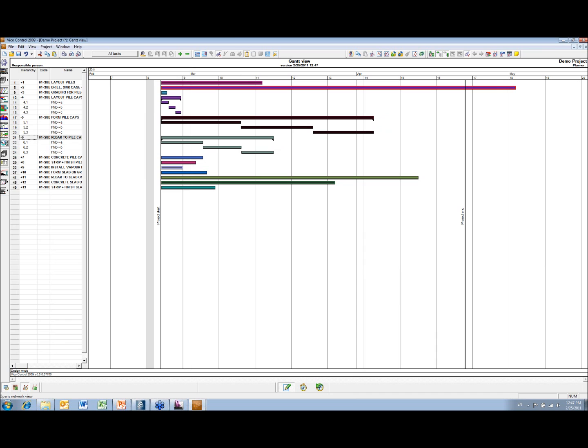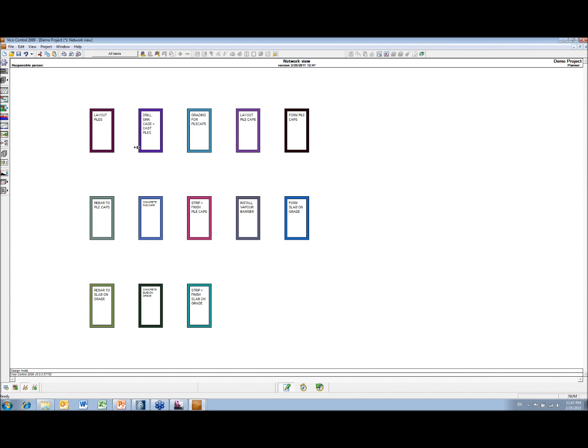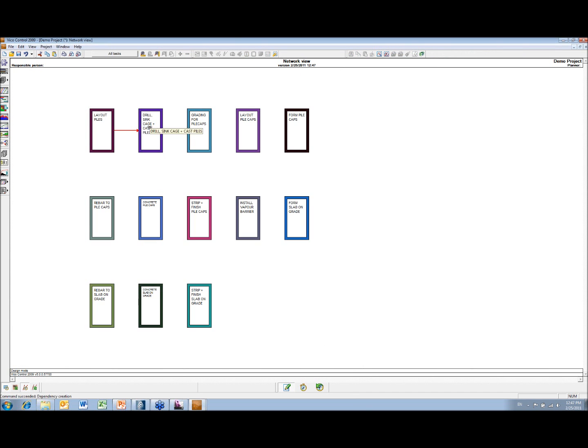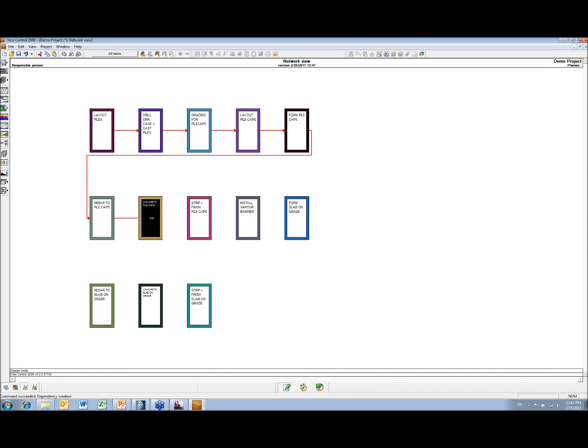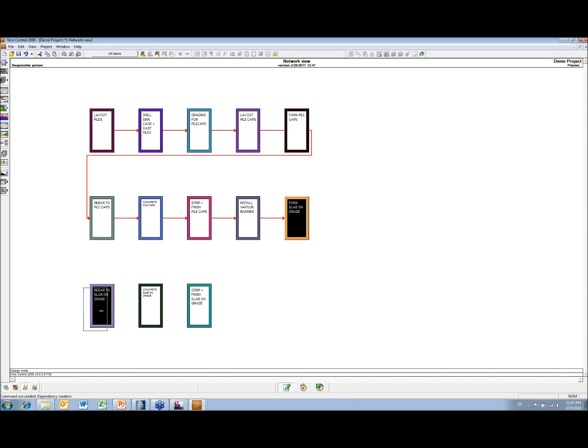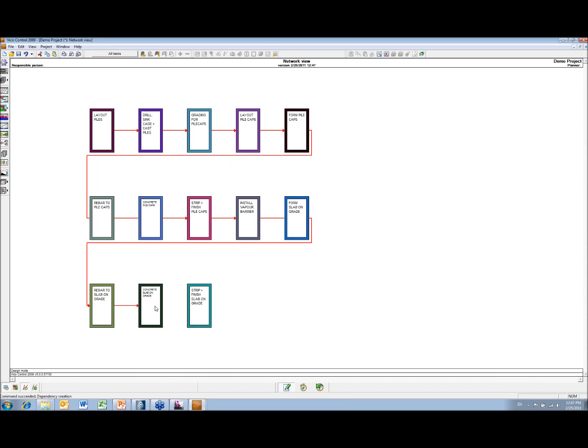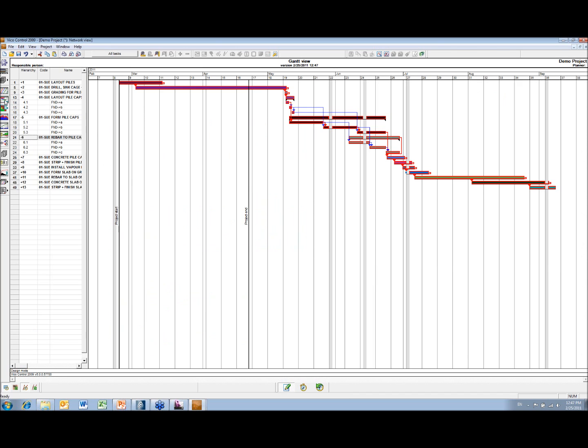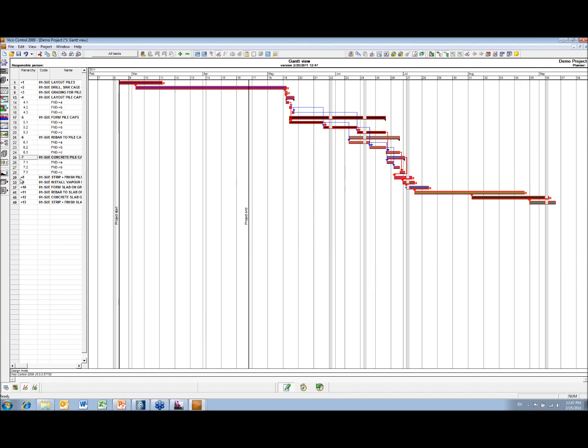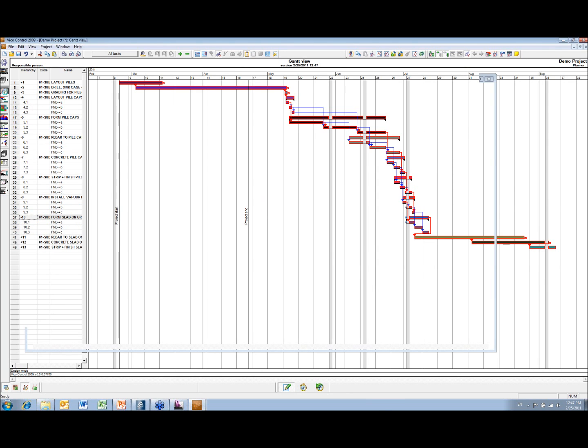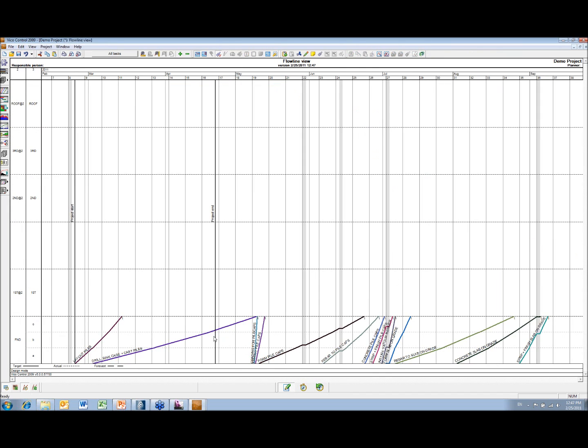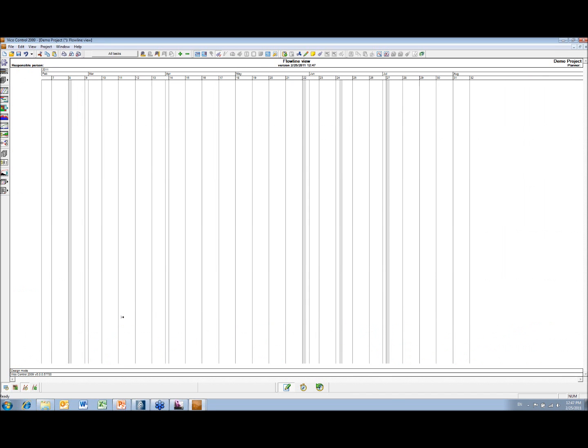And now I'm just going to add some logic, which I'm going to do in this view again. So now we've got the logic. Again, it's difficult to really see much in here, any issues or any problems. I can see in here that the production rates are very, very different, so I'm going to try and balance those.